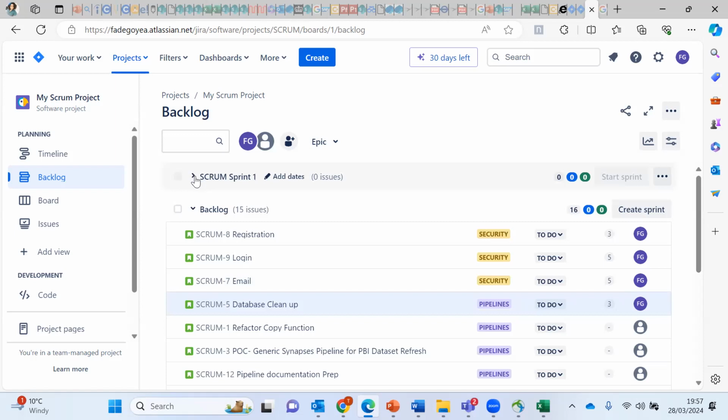priorities for the sprint. Now, when you create your Jira board, and you create your epic and you start working on your backlog, you would see that by default, and I want to be sure that those who are working through the process with me right now are on the same page, Jira will automatically create a sprint 1 for you. Okay, by default, it will just create a sprint 1 for you. Okay, for sprint 2 and all of that, you will see how that works now.